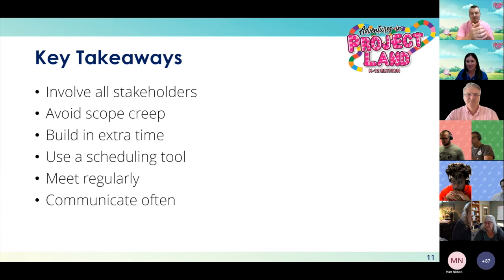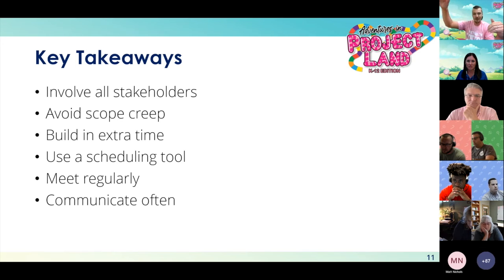I'll say, if you want to be perfect as far as PMI is concerned, you create a schedule baseline at the beginning, and then as your schedule starts to fall apart, because things are going to change, you keep that baseline, and then you measure where you're at now. Your real schedule starts to change and go over here, but you keep that baseline so that you can compare and see the impact.